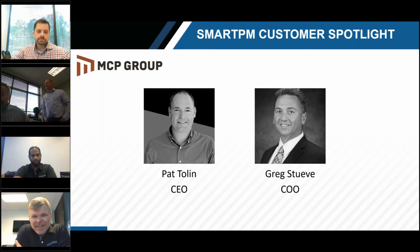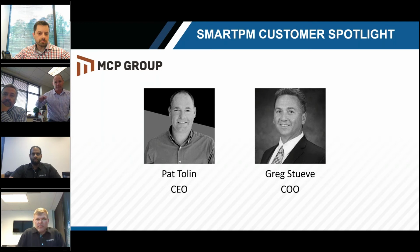The other interesting thing is, Billy, probably what I'm talking about. We've got a PM that's pretty good at tricking the schedule to make it look pretty good. Anybody can do it. He's pretty sharp, but SmartPM's kind of exposed that. And we went to him and said, "Hey, what's going on here?" He knows he's sandbagging, but I've got to tell you, unless you sat down and really analyzed that schedule for 2 or 3 hours, you wouldn't have pulled it out. But SmartPM, in a matter of seconds, when it runs the update, pulls some red flags out that we can sit down and have a conversation about.